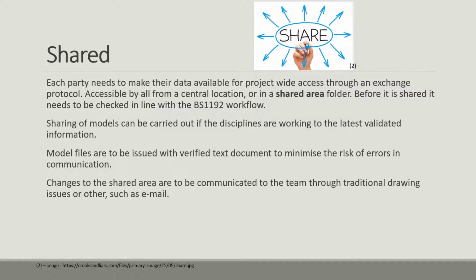Each party needs to make their data available through an exchange protocol. It needs to be accessible by all from a central location or in the shared area folder before it is shared. But before it is shared, it needs to be checked in line with the BS 1192 workflow.